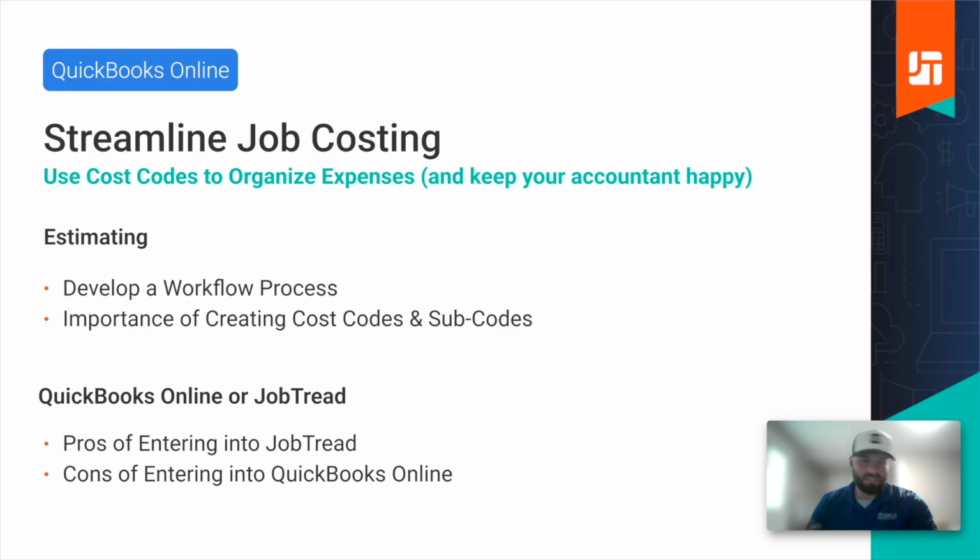And the other side of that, Christine spoke to a lot of this. Christine has worked with us since we met her at that first JobTread Connect. She redid our entire QuickBooks system, made it work so that it would integrate beautifully with JobTread. There are pros and cons to entering different things into different spots. When it comes to job costing and job specific stuff, we want to do every single thing in JobTread. When it comes to QuickBooks and entering in receipts that aren't job related, that goes into QuickBooks. That's something that Christine does. If you were to do it the other way around, it doesn't always push back into JobTread, and you may not have accurate numbers. So you just want to make sure you're doing that accurately.